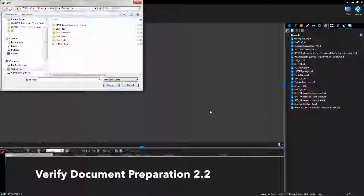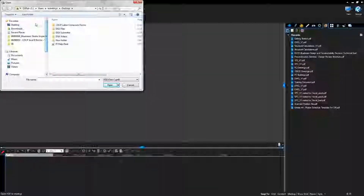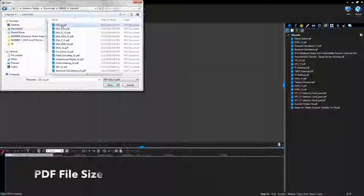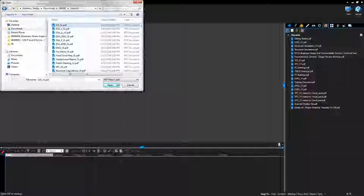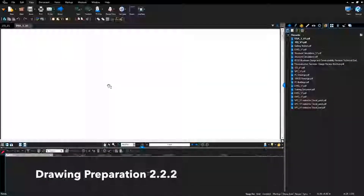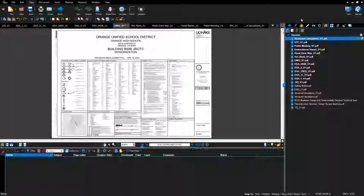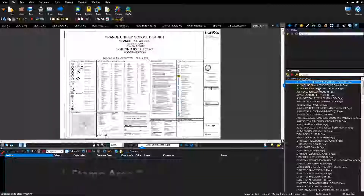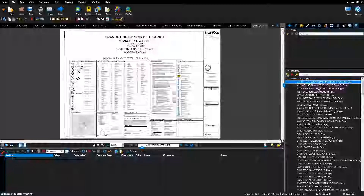Confirm formatting of documents: Go to Bluebeam Studio, select open, go to downloads, select file and click open. Verify file size of all files by selecting all files and clicking open. Verify drawing preparation and confirm that a blank stamp area has been included on each page of the document for the DSA digital identification stamp.